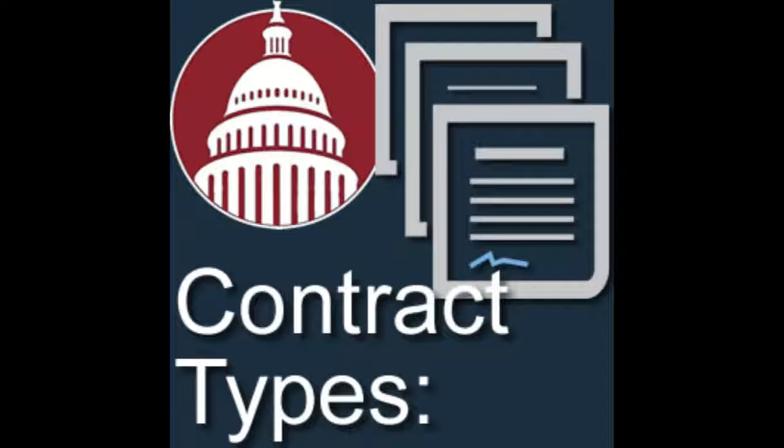Right. So in numbers terms, a $100 contract with 10% fee is a $110 contract, right? If you overrun and you spent 10% more in a cost plus percentage of cost arrangement, you'd get 10% more fee, so you can see all that does is incentivize industry to spend more money and increase their costs because they get more profit out of it. So it's easy to understand why that is a bad thing, but maybe not clear that it is actually prohibited by the FAR. Correct. So now you know.